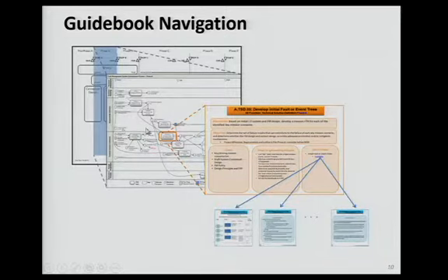This is phase A. You zoom in there on a particular task, which describes what the task is, why you do it, inputs, outputs, and what the steps are, and then even some examples of deliverables, either an example from a previous mission or a template of what we think that product should look like. So this really does pull from past experience and lets us codify, if you will, how we do fault management.